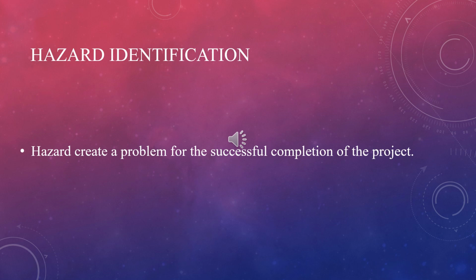The late delivery of that component is likely to have an effect on other activities and might, particularly if it is on the critical path, put the project completion date at risk. The hazard here is the illness of the team member. The problem is the late delivery of the component, and the project completion date is at risk.